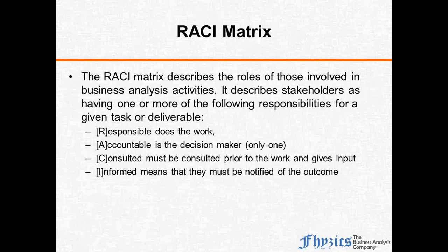So the relationship is typically that the responsible people, in most cases, report to the accountable people, right? And the consulted and informed are two other different groups. Before introducing any change in a process, I have to talk to the people who will suffer a huge impact. That is consulted. I'm going to impact some amount of their activity or the way they do their work. And informed people are those to whom I have to just provide the information that this is the change we have made. That is informed people.